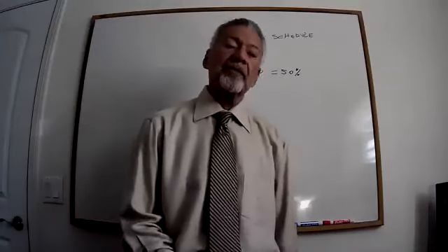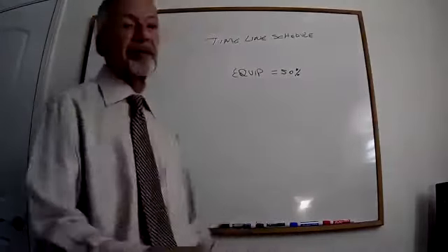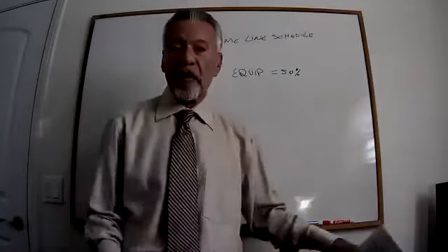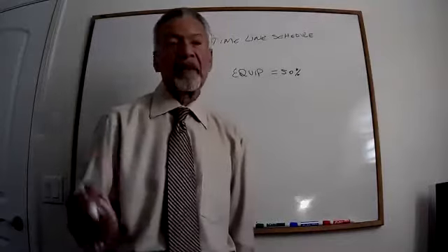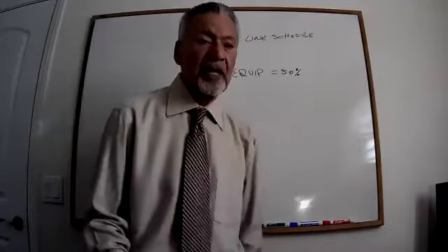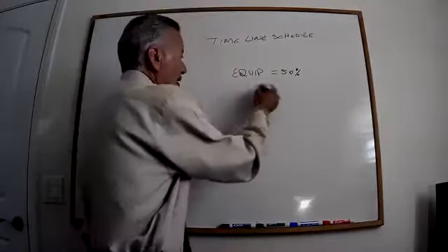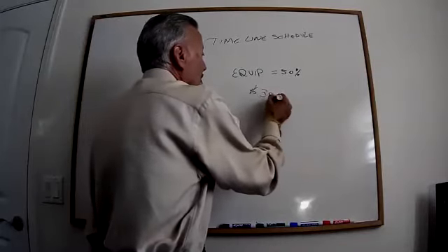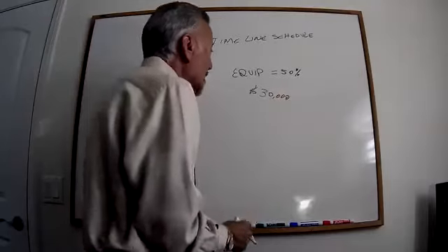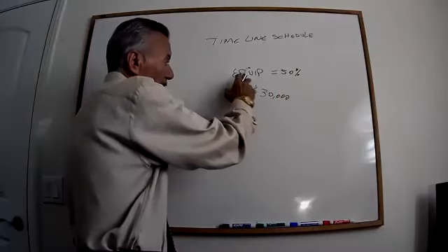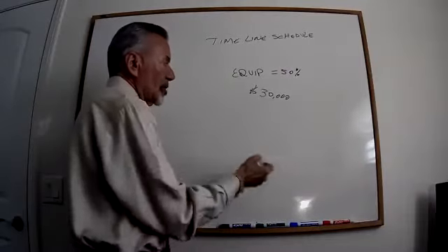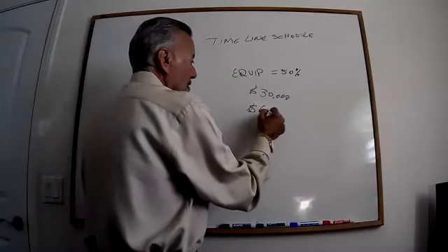So that means you have to pay $20,000 just for the panels. And then you have some wiring and all of this, so you estimate that would be $5,000. So all of a sudden you have the cost, and let's say $30,000 would be your equipment cost. If your equipment cost of $30,000 is equivalent to 50%, what is your total cost? Your total cost would be $60,000.